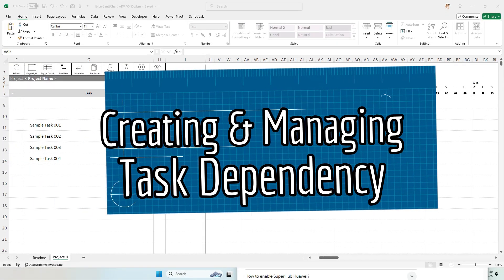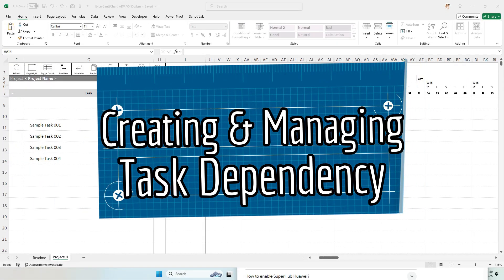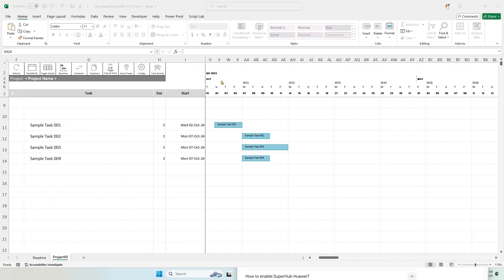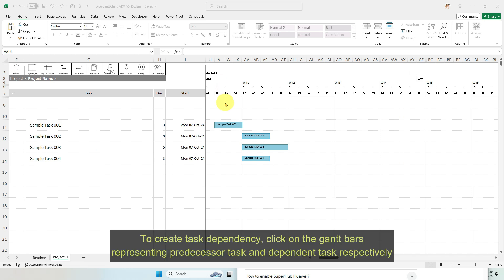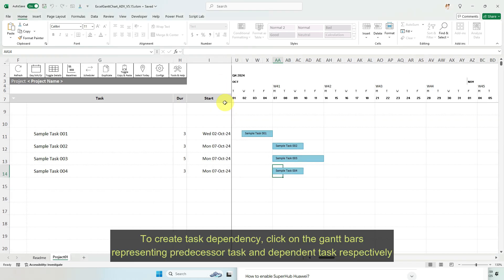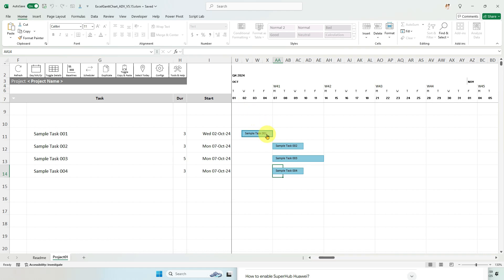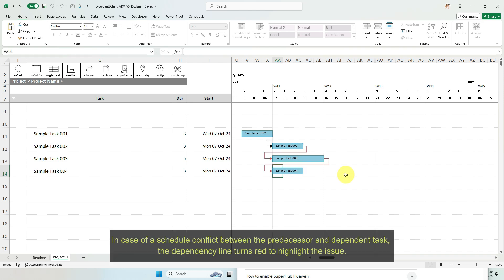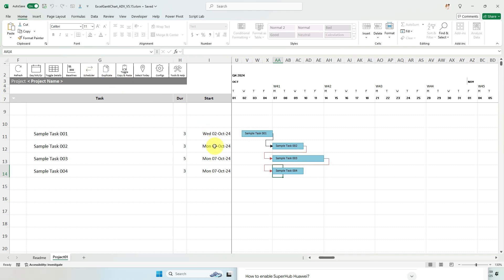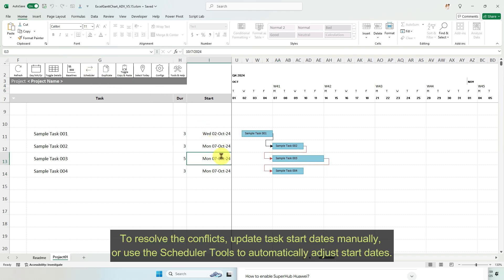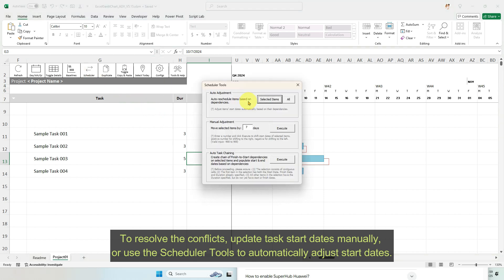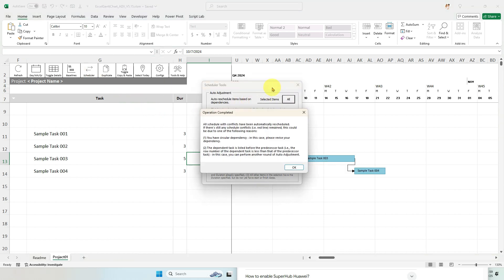Creating and managing task dependency. To create task dependency, click on the Gantt bars representing predecessor task and dependent task respectively. In case of a schedule conflict between the predecessor and dependent task, the dependency line turns red to highlight the issue. To resolve the conflicts, update task start dates manually or use the scheduler tools to automatically adjust start dates.